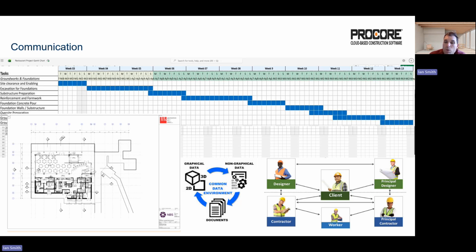Any inspection results and quality checks will also be communicated at certain stages of the construction, such as foundation excavations or drainage installations, as these require inspections from LABC before work can continue. Communicating these results ensures that everyone involved knows when a stage has been approved and when the next stage of work can begin.